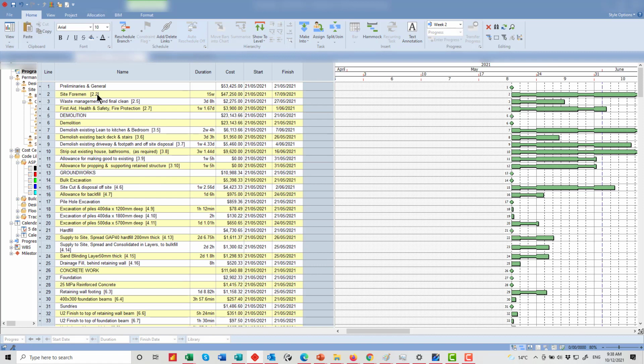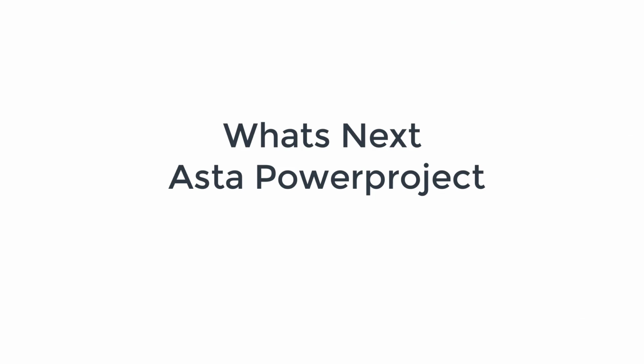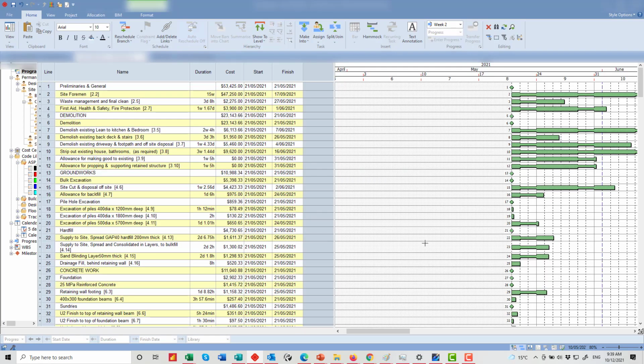And as you can see, it's brought it all through. So what you can see is we have the description, we have the hours, and we have the budgets. Obviously the dates don't make sense yet, and we have to set up all of our links and our dependencies, and I'll cover that in the next video. That's the way of getting a report from a quantity surveyor, using that report as the method to create your building program, which makes sense because you have the hours and the budgets.